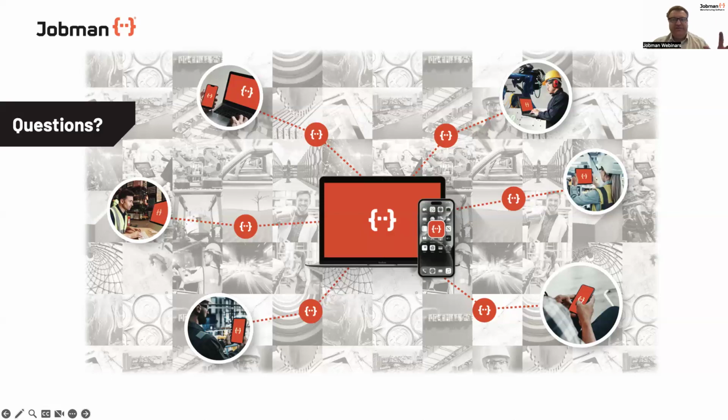The advantage of the system is because they can see from the kiosk what is already allocated, you know that they're not pulling things from stock that shouldn't be pulled. Just because there's 20 of those hinges on the shelf or draw runner sets, doesn't mean they're actually physically available. So being able to see that and turn around and say, well, hey, no, sorry, I can't help you there. They're all allocated to jobs right now. You're going to have to create an alert and let the project management team know. And it's an important part of the process.